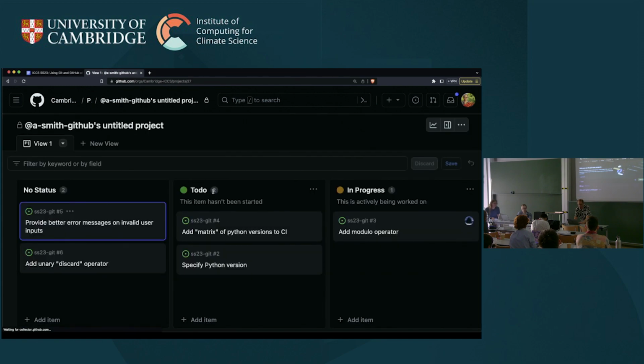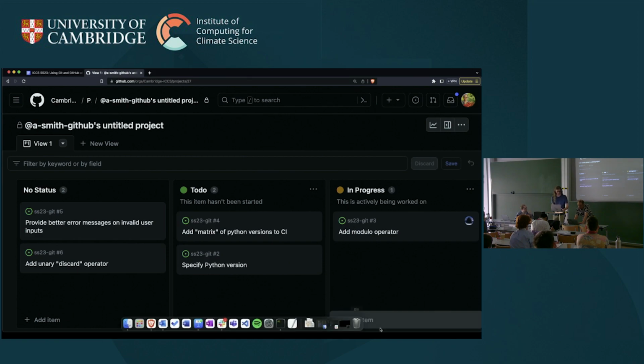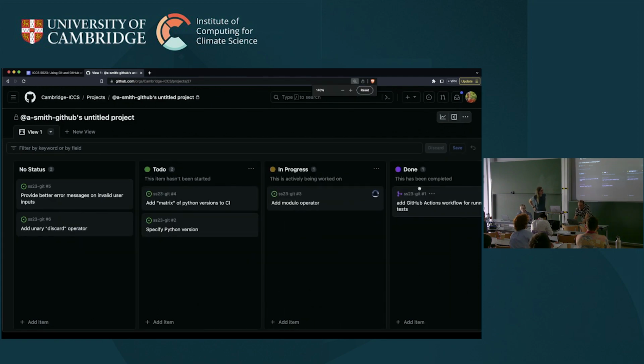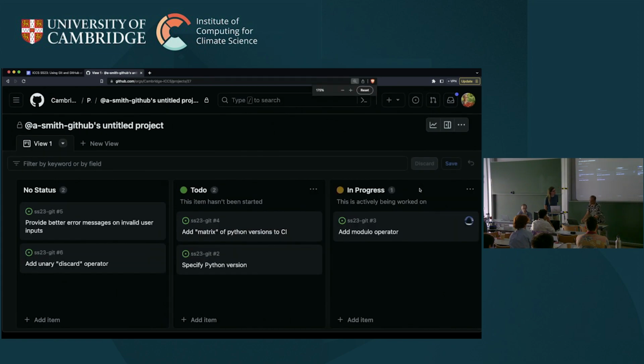Anyway, that's my bit of work done. It looks like we have continuous integration testing in this repository now. And if we go to the in progress column, oh, look at that, it's already gone. And if I could find my scroll bar, we would see, I think, if I zoom out, there you go. You can see it's been moved automatically to the done column. There is an automation action inside this project, which means my card has moved over to the finished state, which means anyone who's doing any work now can use this change in their branch. So I love these project boards. So that's my bit of work done. I know Simon's about to do something. Looks like he's about to add the modulo operator. So I'm going to give him some space to do that.